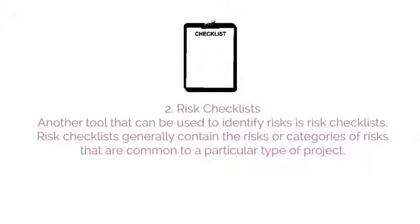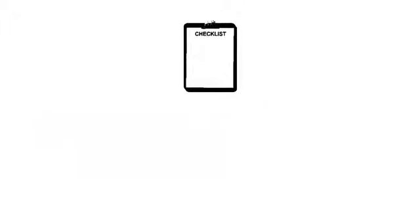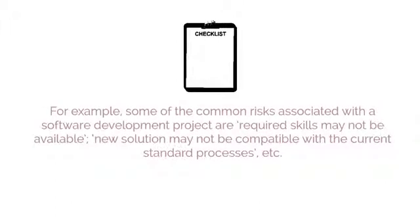Another tool that can be used to identify risks is the Risk Checklist. Risk Checklists generally contain the risks or categories of risks that are common to a particular type of project. For example, some of the common risks associated with a software development project are: required skills may not be available, or a new solution may not be compatible with current standard processes. Following is a template of a Risk Checklist.